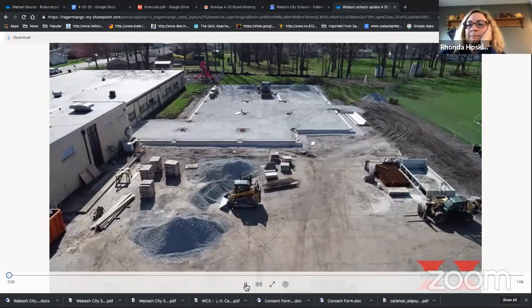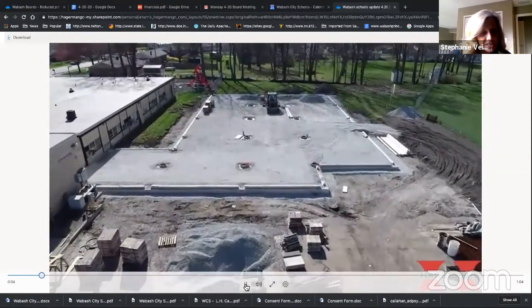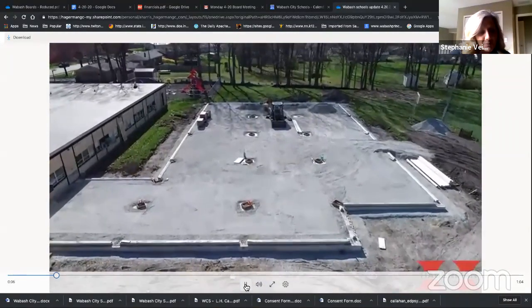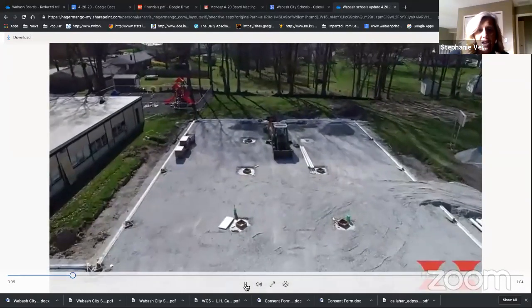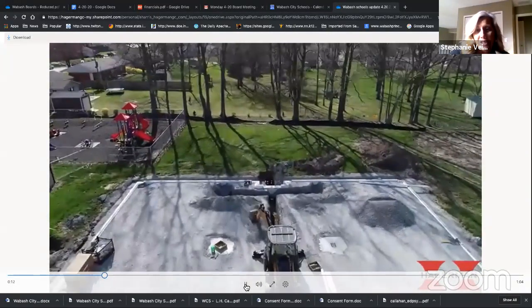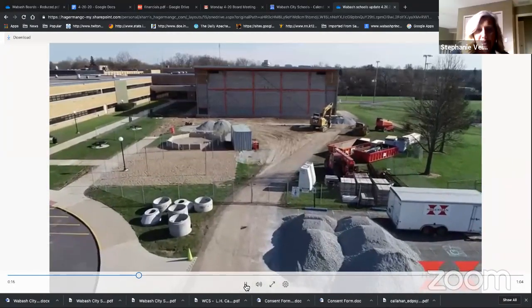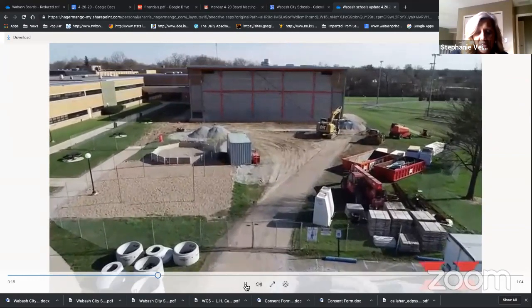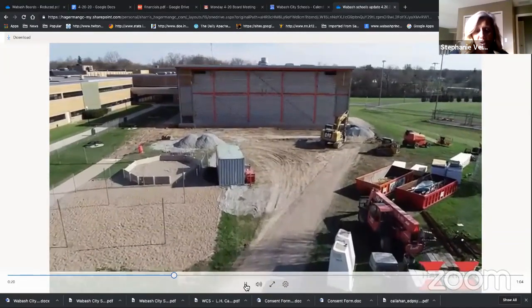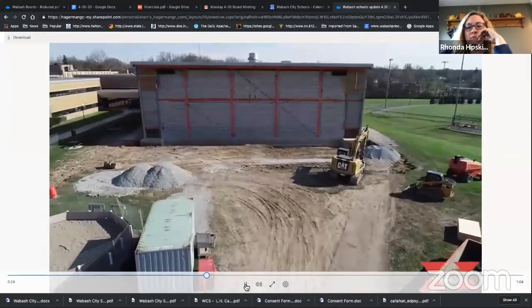We did a quick flyover of LH Carpenter. As you can see, we have completed excavation prep and we have the column footings already poured there. And so they are ready for the foundation to actually start going up. They're doing some plumbing there now. So that moisture barrier and rebar will go in next week and ready for the slab to actually be poured.